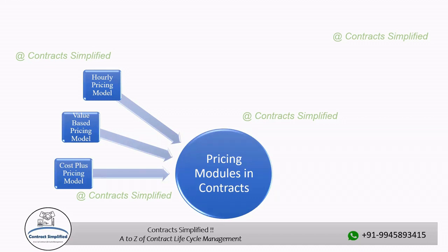To accurately bill clients, the service provider needs to track the amount of time spent on the project. This can be done manually, through time tracking tools, software applications, or automated systems. Service providers invoice their clients based on the number of hours worked multiplied by the hourly rate. Invoices often include a breakdown of the hours spent on different tasks and the corresponding charges.